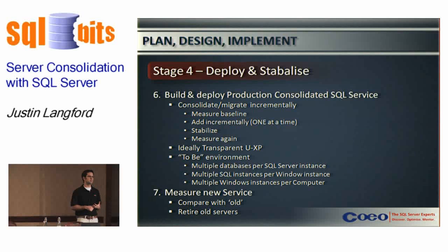So this is where the baseline comes into play. And people are very quick, developers particularly, to point at the infrastructure and the database platform as being the cause of performance problems. And we need to be able to categorically prove your reads per second and writes per second to the storage were this on the old server, and this is what they are on the new server. So they're the same or better between before and after the upgrade, the CPU utilization, TempDB consumption, really to get good visibility of those components so that we can be sure that we de-risk the project for ourselves to be able to prove the performance characteristics before and after the consolidation.